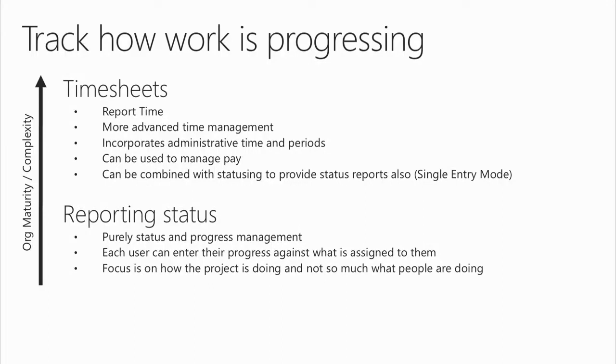With timesheets, you're looking at figuring out exactly how someone is spending their time so you can actually pay them basically based on that. There is by default a distinction between the two features, and the stuff that you put in timesheets doesn't come into the status. They're separate.